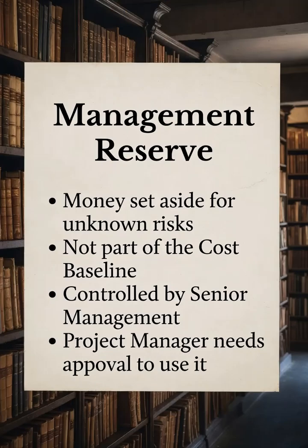Now, let's talk about management reserve. Management reserve is money set aside for unknown risks, the ones you did not identify in advance. Key points to remember. 1. It is not part of the cost baseline. 2. Senior management controls it. And 3. The project manager must get approval before using it.